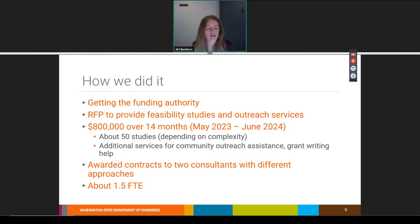So in all, a little less than $800,000 is getting us about 50 feasibility studies, and that does depend somewhat on the complexity of those, and we still have some to be completed. It also included some additional services for community outreach assistance and some grant writing help, not full grant writing services, but some help, kind of phone a friend type help for grant writing.